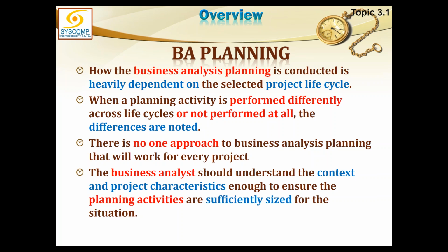And it is pretty much sure that the same life cycle will be used by the project manager. And if it is not used, then this is a disparity which may occur, and we must accept it, that business analysis was done on another life cycle, but the project manager decided to change the life cycle, and thus the business analysis work is no more valid. As we already understand that business analysis is also a continuous process. So when something like this happens, the business analyst will revise his planning. While the project is going on, he will revise his plan and they will coordinate with each other.